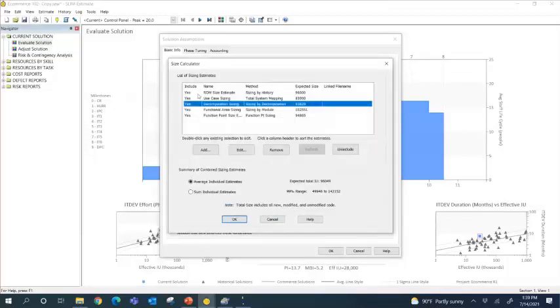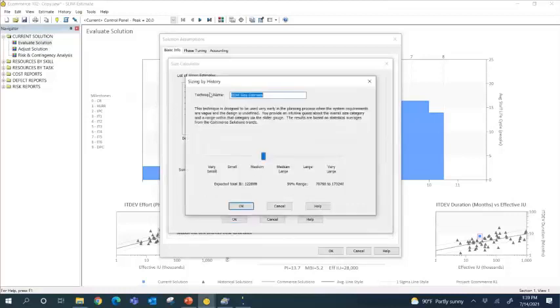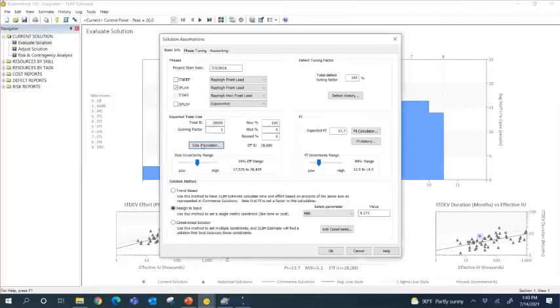If you don't have any historical data, then we're going to leverage the QSM historical data from that industry database, and we're going to use a t-shirt sizing technique here, or a rough order of magnitude size estimate, and just tell Slim, is this big, small, or medium, right? Small, medium, large. And when I do that, it's leveraging the QSM historical data. And we're using a range because we're early in the decision-making process, right? Okay, so we want to be able to input this information based on our experience, based on actual data points, size, how we allocate our resources, and then that productivity index again. Remember, we talked about that quite a bit.